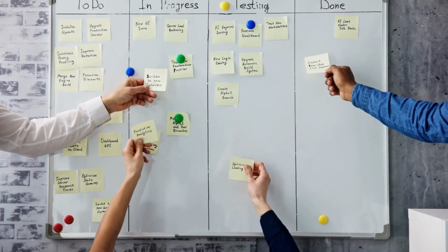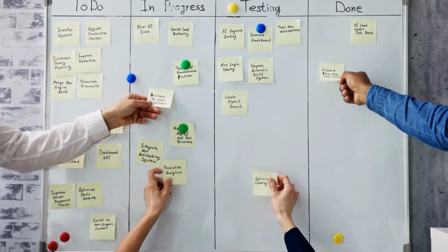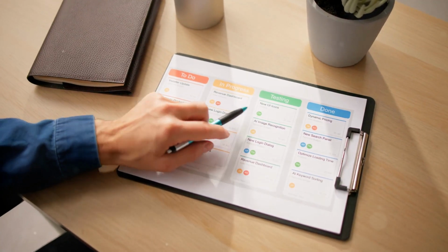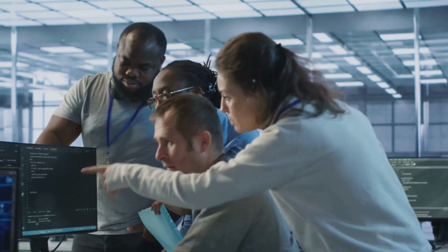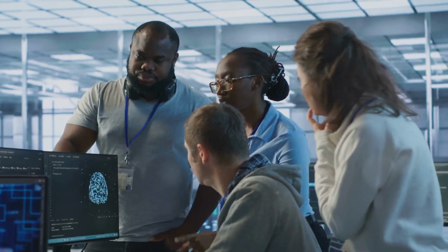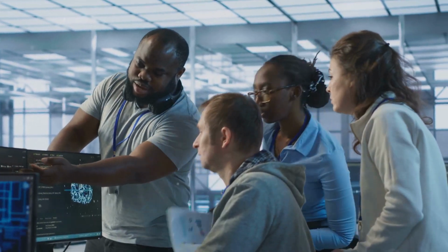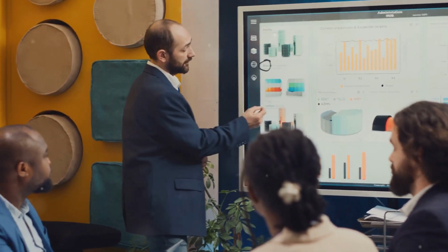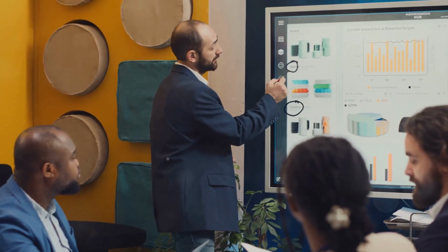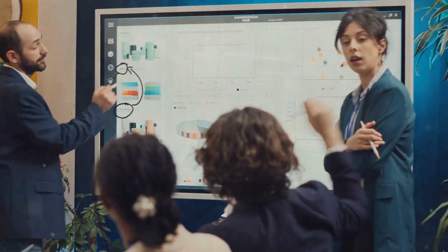Measuring lead time is typically done using tools like Jira, Trello, or Azure DevOps. These tools track the date a task is created and the date it is marked as done or deployed. Teams can analyze this data to find average lead times, track progress over time, and spot delays or trends. This visibility helps in making data-driven decisions to improve the development process and manage expectations with stakeholders.